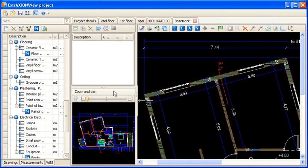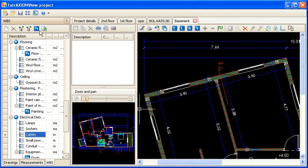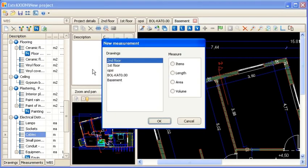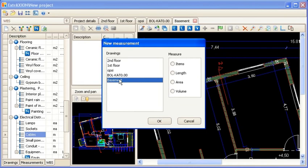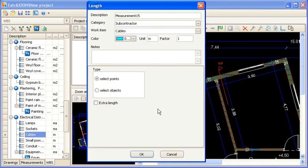Furthermore, you have the ability to measure lengths which are not visible in the drawing, because, for example, they are perpendicular to the drawing. For instance, you can measure the length of the cable which runs across the ceiling and bypasses beams. After creating a new length measurement with the appropriate characteristics, you can activate the extra length option in the length window.